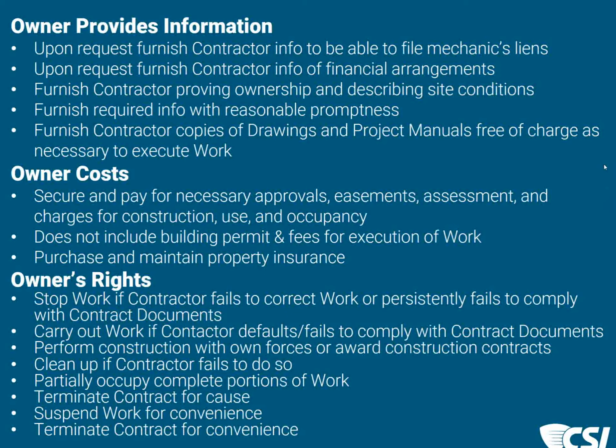It would be absolutely coordinated with the authority having jurisdiction in the area to say yes or no, this is safe, this is within our expectations of an area being complete, with certain ramifications of systems and the ability to have safe access and exit way and that sort of thing, so that that area could be finally reviewed, inspected, punched, and turned over and have independent systems.